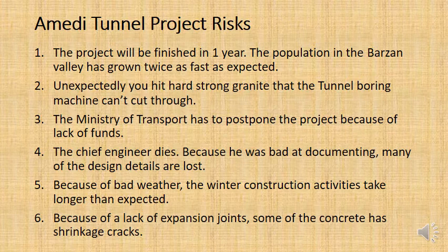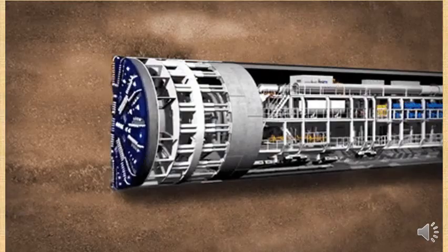We normally do this after we've written the work breakdown structure, because that helps us identify certain risks. We can often determine what risks are applicable to different work packages, for example. We would be brainstorming this as a team, and then we will be basically analyzing them for impact and likelihood. So that's what we're going to do now in the next few slides.